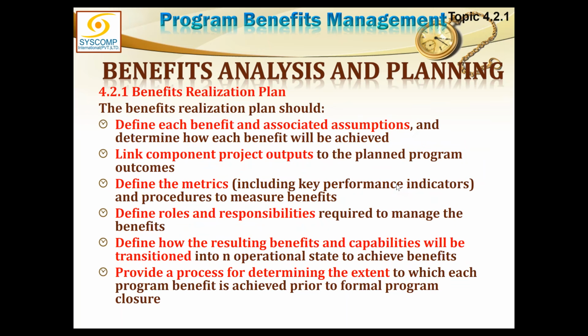Benefit realization plan specifically should define each benefit and associated assumptions, determine how each benefit will be achieved, link component project outcomes to the planned program outcome. So whatever the state of the projects is, that is going to be contributing towards the overall planned program outcomes. Then how it is to be measured, what the KPIs are, and what the measuring mechanism is that is defining the metrics.